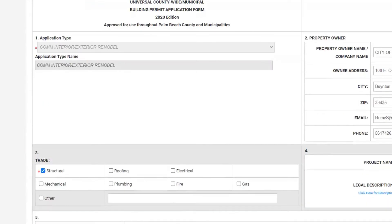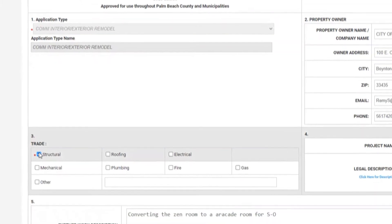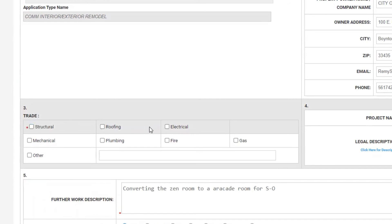Now this here is a duplicate of the application that was submitted by the general contractor on the master project. We now need to change this application to reflect the subcontractor's scope of work and information. So in box three, we're going to uncheck the structural box and select electrical.